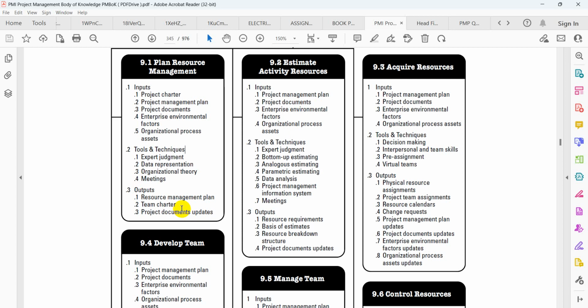Sometimes they call it a resource breakdown structure. It's an output here. Why? Because we say, okay, how many people are we having in this project? There are 150. Then we start breaking down. Okay, 4 people work here. We start breaking them down. 7 people will go here. 10 people here. Okay, after that, you break them down until each one is allocated. They put them on a resource breakdown structure. Also on a resource chart. A resource chart is just like where you put, it's the same document anyway, like a resource breakdown structure.